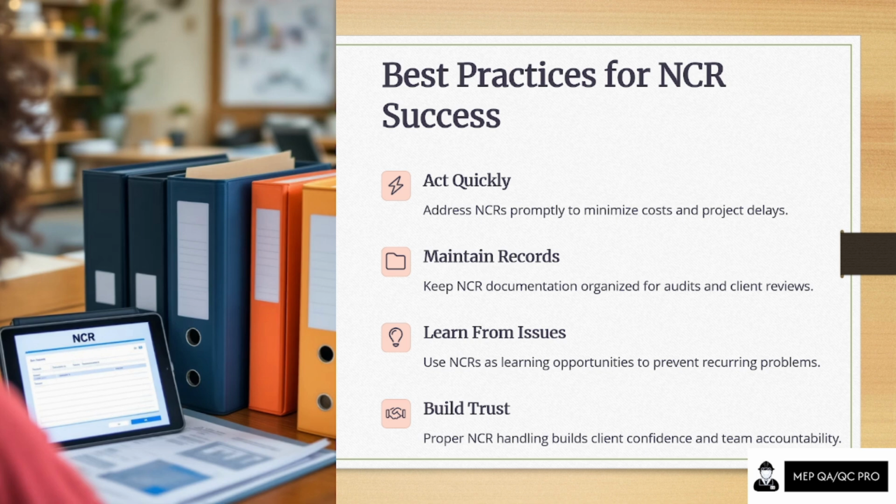Whenever you are raising an NCR or you are receiving an NCR from the consultant and client, the first thing you need to do is act quickly. You need to address it with your team to avoid delays and minimize cost. Because I saw so many projects, I did so many audits. Engineers are not taking NCRs seriously. So you have to act quickly, on the same day, the same time when you receive it. Meet with your team, do an internal short meeting, and brief them on what NCR you have received.